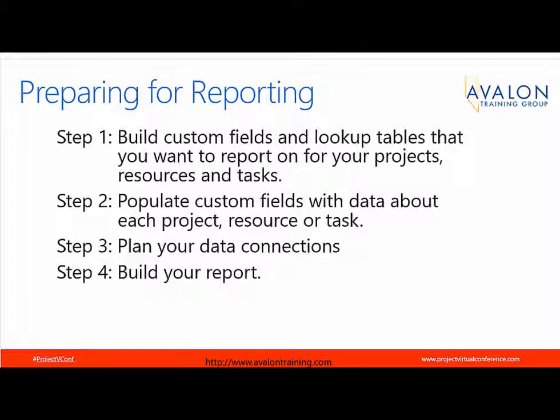Of course, building these reports does take some planning. A lot of my examples today relied on custom fields. So custom fields, whether it was summarizing my projects by who was the sponsor, what was the project funding, those are all custom fields that I built into my database, populated all my projects with the appropriate metadata, then planned my connections to include those custom fields, and then build my report.